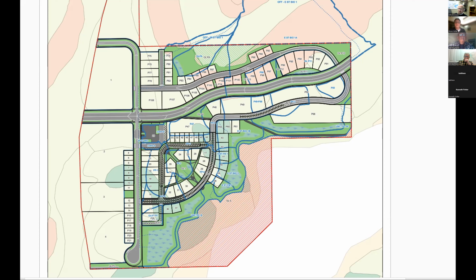This is Kathleen, and I just wanted to state that our attorneys have been going back and forth with myself and Bruce as we're finishing up our first draft of the covenants that we want to present to the city to review. We've been tightening up the language regarding the stormwater management and the requirements by the homeowners in terms of the pervious pavement on the driveways and the additional measures that will be required. Ken, I'll also take some of the language you just said regarding the downspouts, work that into the covenants, and then present that section back for you to review. This is a requirement for each one of the homeowners. They can't build unless they're going to use the pervious pavement and agree to these additional stormwater measures.